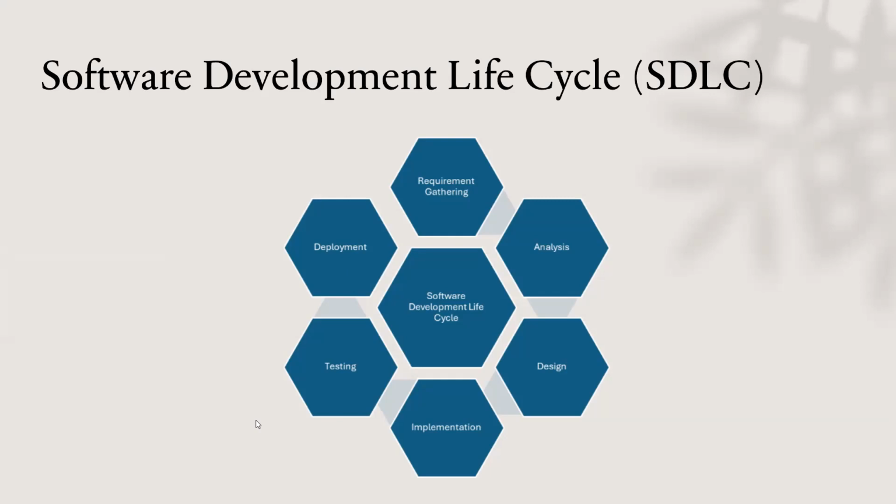After the deployment stage, we'll now be going to the formal closure of the project, as well as the maintenance and handing over to the BAU. Now, BAU is actually business as usual. When we come in delivering a project, after the project is delivered, we hand it over to the owners who will continually use it. That's what we call the BAU, that will be using the product when the project has ended.